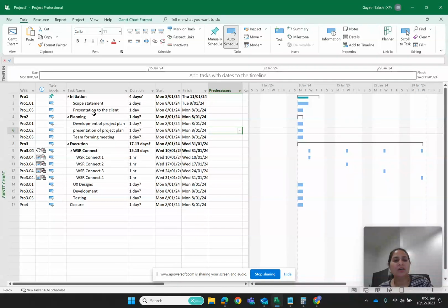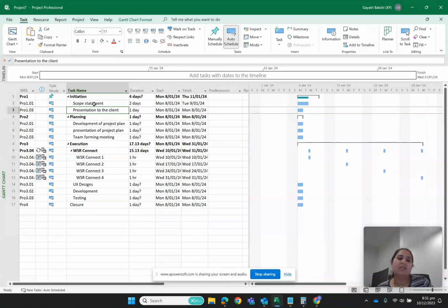Until my scope statement is ready, I can't present that to the client. So I will say the predecessor of this task is number 2.